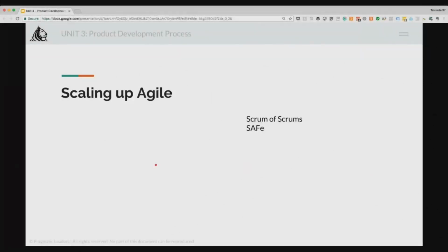That's one approach. Second approach is if you have a lot of teams, for example, in Agile's case, there were about 25 Scrum teams running together, right? So what you can do is you can conduct a small Scrum of Scrum where a team representative will quickly just mention कि मैं क्या कर रहा हूँ, मेरी टीम में क्या होता है, and it can be done once in the week or once in 2 weeks. So it is not exactly the regular Scrum, but it's a little larger. Obviously, 25 लोग बात करेंगे तो 15 मिनट में नहीं हो पाएगा, and that's why it's very critical that time is respected and only one person just presents कि मैं क्या कर रहा हूँ, so everybody is aware कि what is happening in the entire organization.